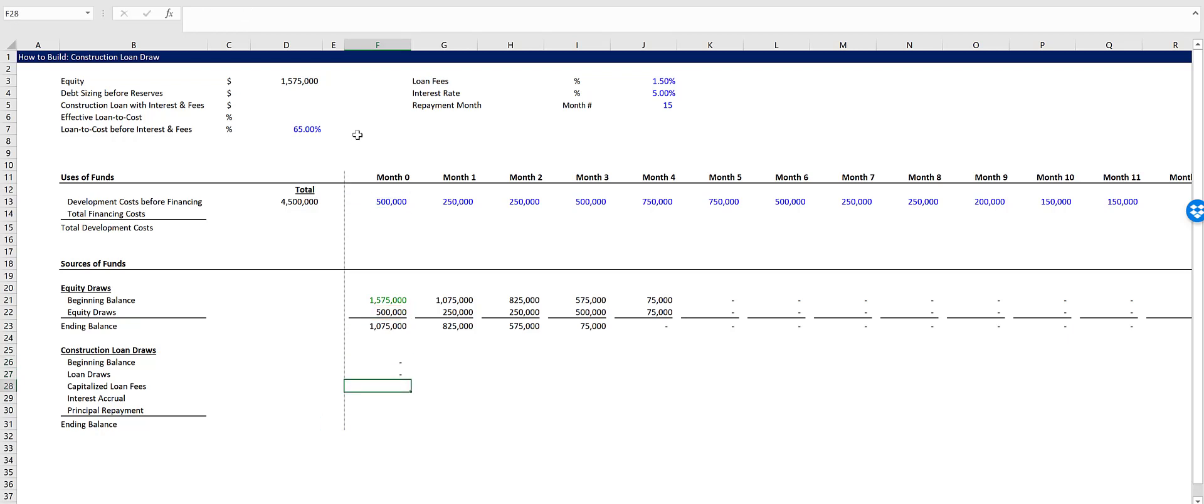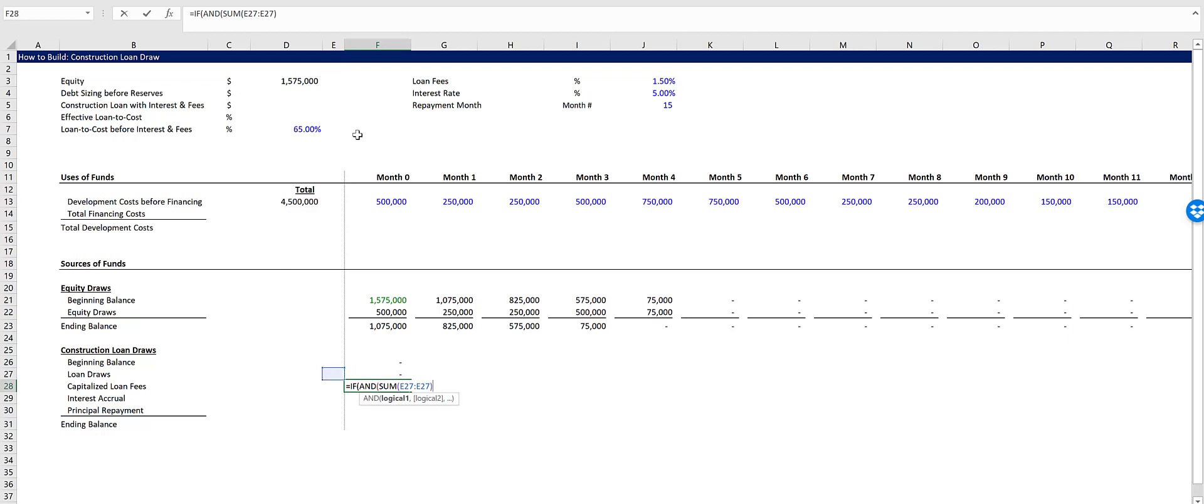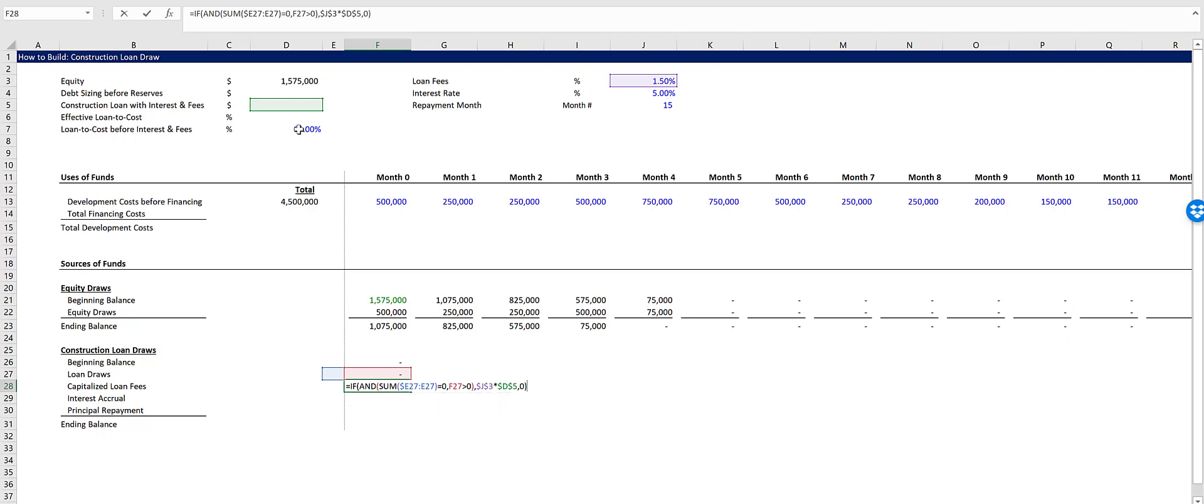And then we have our capitalized loan fees. So what we want to happen is we want the loan fees to accrue in the first month that we draw down the loan. We're going to use an if-and statement because there's two criteria that we need to meet. If the sum of all the previous months, lock in the column, equals zero, and the current month is greater than zero, we want to return the loan fees, lock that in, times the construction loan with interest and fees. Otherwise return zero. We don't have anything up here yet, but this will populate once we reach our circular reference.